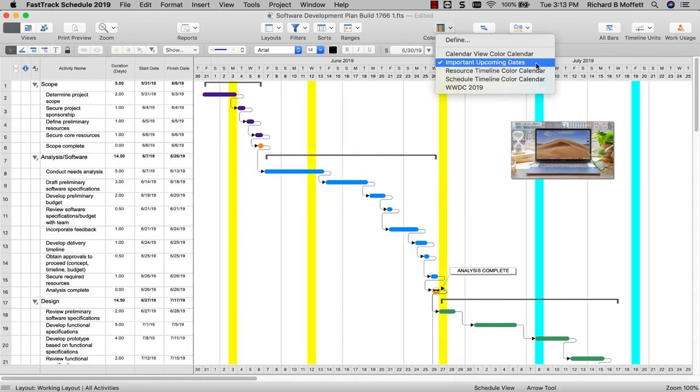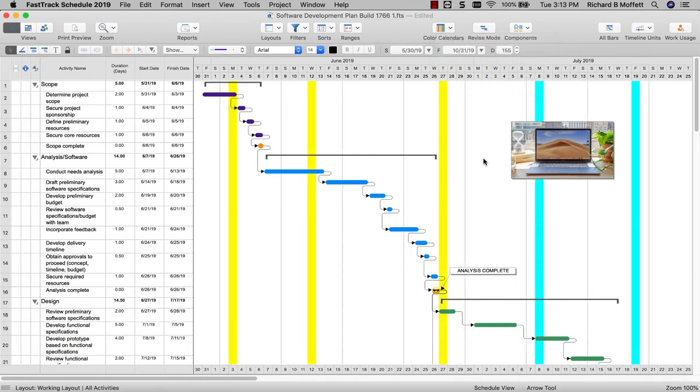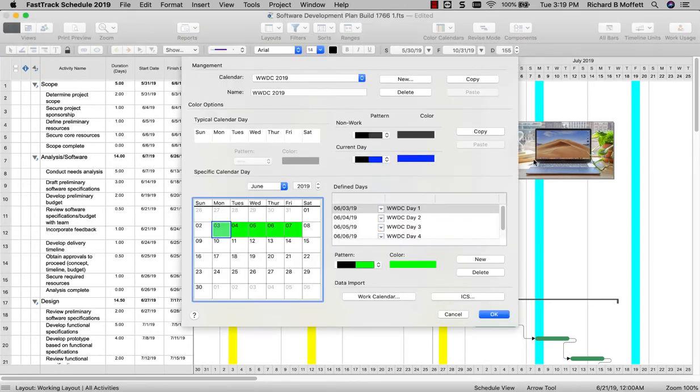In previous versions of FastTrack Schedule, the only days you could mark were non-working days. Now you have complete control to highlight any periods of time in your projects to denote holidays, critical stretches, deadlines, or anything else you need.